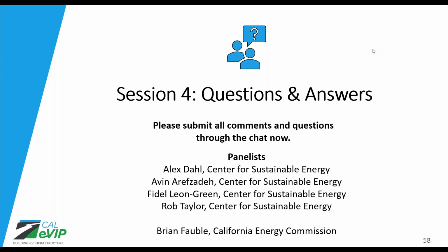Okay, and then question for Rob. Are they able to designate one account manager for all their applications to be able to have a one-point person to handle all the Teamwork submissions for the construction progress tracker after? So yes, whatever email is associated as the application manager for the initial application will be sent the initial invite to Teamwork. We can invite additional collaborators to those projects, and we can, on email request, make any individual the main point of contact for those emails.